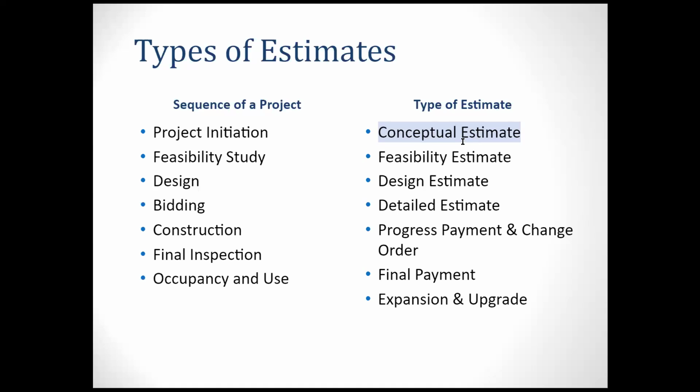A feasibility study is like thinking about whether this project can survive, because you are going to invest money and want to know how long until you get the return. Does that make sense? If you are going to run a restaurant that costs $100, just as an example, as an investment in the first 2 years, and then starting in the 3rd year you run it and have cash coming in, you get $2 per year. How many years until you get the $100 back? 100 divided by 2, you get 50 years. That is the return period, 50 years. All of those things are included in feasibility studies.